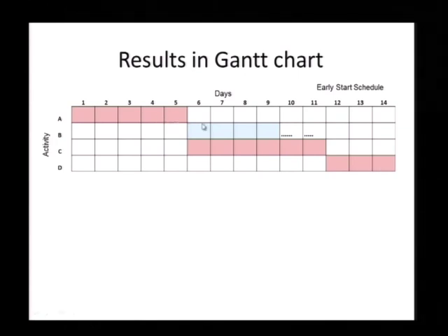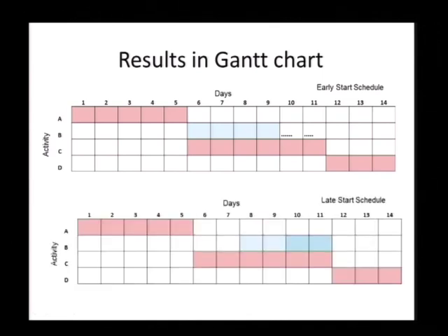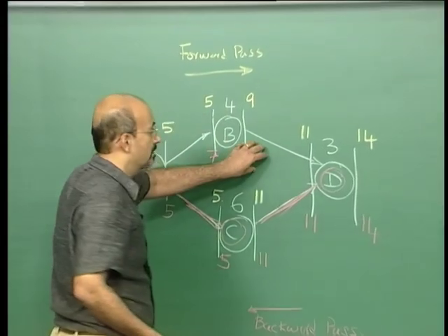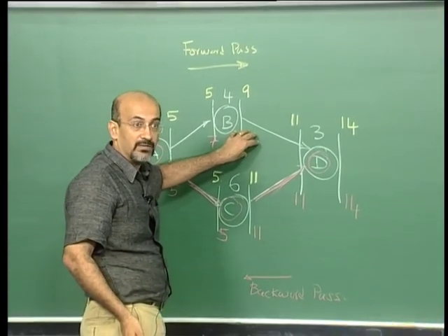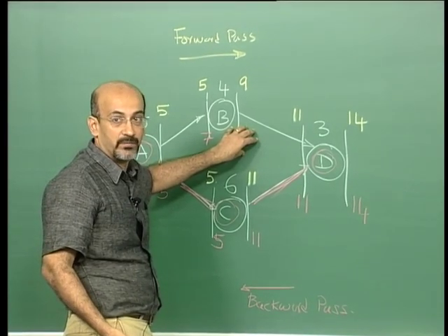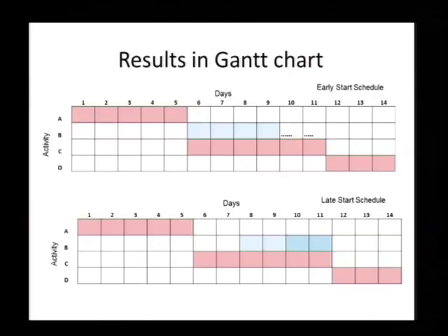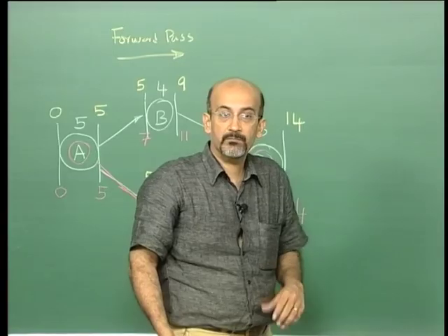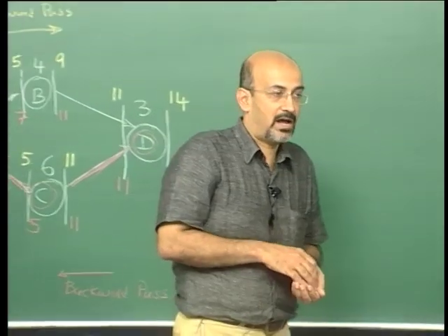Now we have seen that this is what we call the early start schedule. Now if I go to the late start, what happens? The only thing I can do when I move to late start is to move B all the way to 11, and if I move B all the way to 11, the project is still okay.